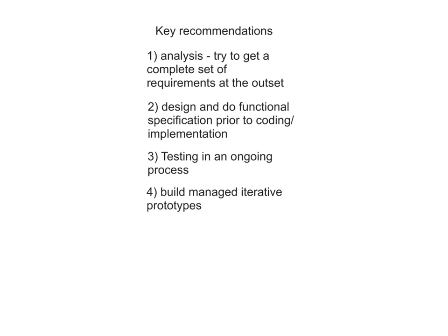So usually, once you're getting into your implementation phase, you can sit down with your supervisor and agree what you will bring to the table next time, which will be these incremental functions. You'll implement various functions incrementally and plan these prototypes, and crucially plan the testing of these prototypes as well.